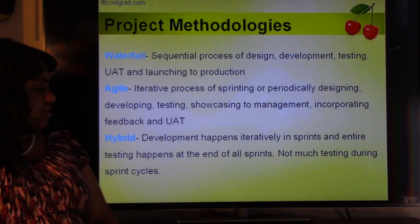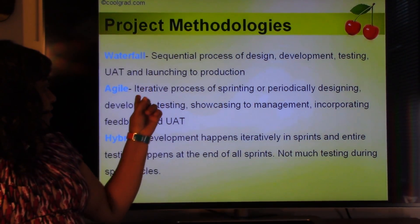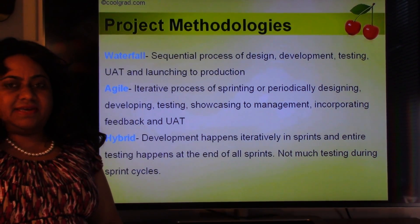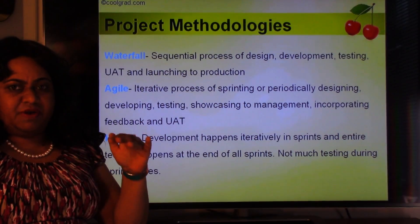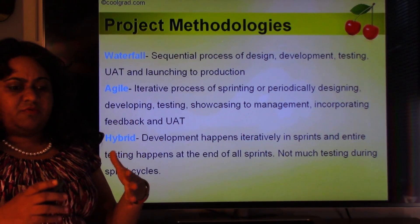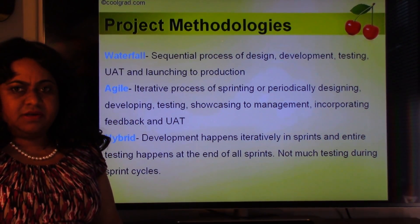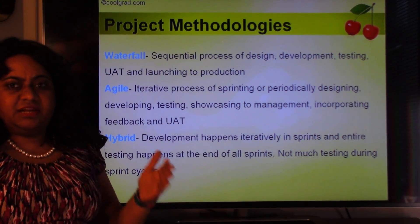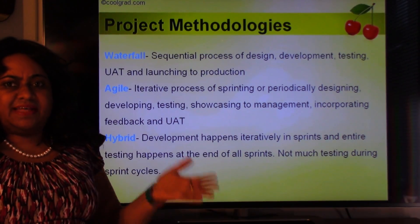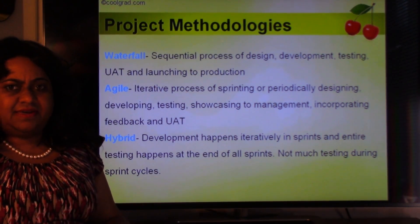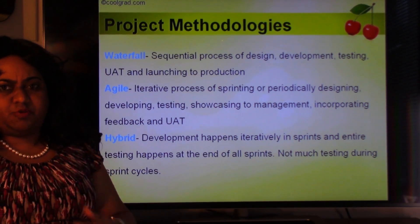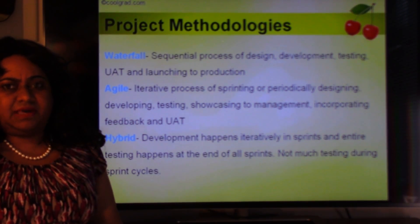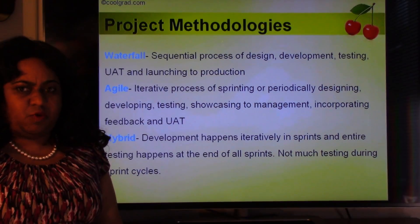Let's talk about the different project methodologies: Waterfall, Agile, and Hybrid. A waterfall project is one in which we do things in a sequential manner. First we do all the high-level planning, then all the design, then all the development or coding, then all the QA or testing, then UAT, and then launch to production. Things happen like in a waterfall, step by step, sequentially. That's the waterfall methodology.